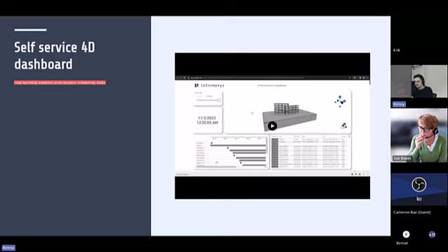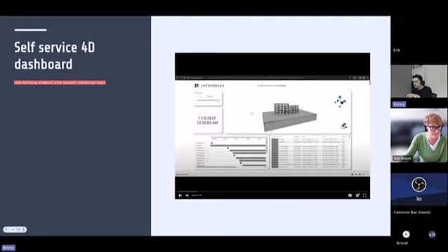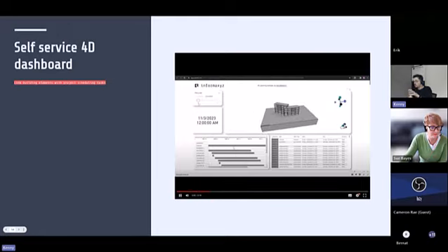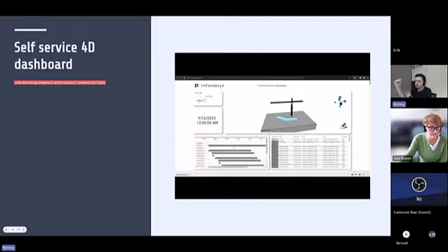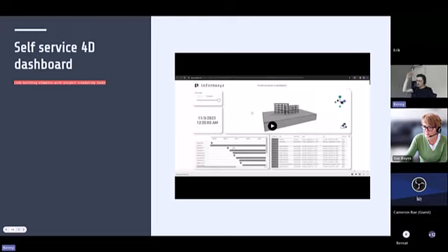You can bring in that information, but the moment that you can link that information to a 3D model again, it becomes more a tool that allows you to verify if your construction schedule is correct, because you could immediately go through time, and the moment that you see, for example, you're pouring concrete on the third floor, but the second floor is not ready yet, then you know that maybe you have made a mistake in your construction schedule. Also, construction schedules are usually, I don't know, 1,000 lines in this Gantt chart, and honestly, only the person that's responsible for this construction schedule knows the ins and outs of it. But again, if you link it to a 3D model, it becomes much easier to communicate as well.